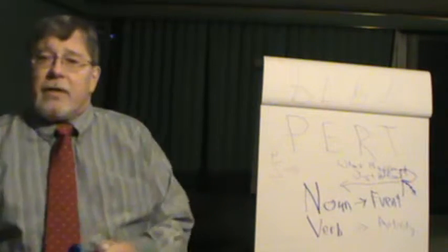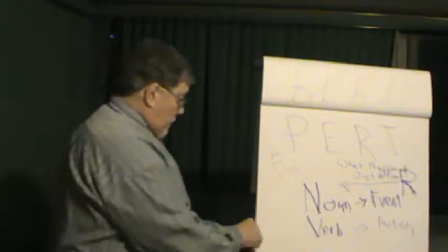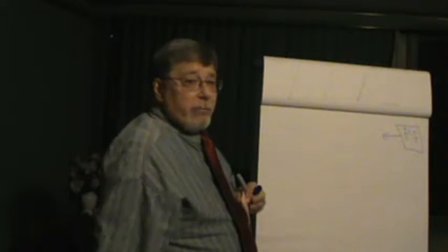So if we wanted to plan out a party, we would start with party ended, and ask the question, what happened just before that?